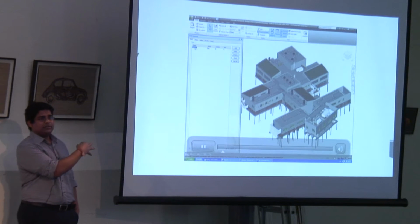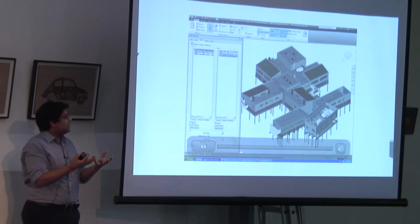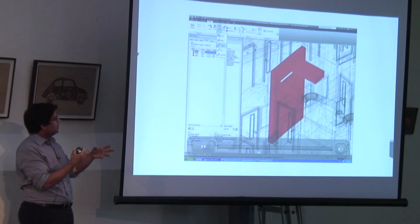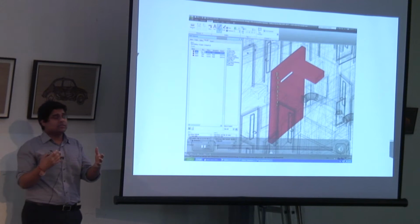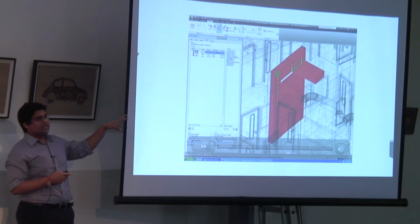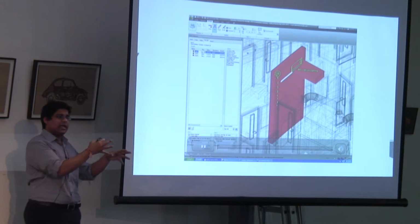There are other software like Navisworks, which obviously are appended. You append the model in this software to run, for example, clash detection. The principle, obviously, is that two things can't occupy the same space, and hence it automatically knows where those clashes are. But also, you can put in tolerances. So, for example, if a piece of kit needs a certain tolerance for maintenance operations, that can be put into the model as well. Again, from this, you can output a report, like an HTML file, which becomes the notes and actions for the next DTM.